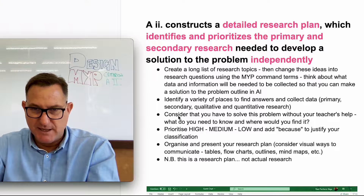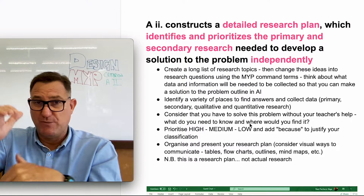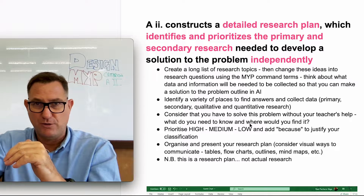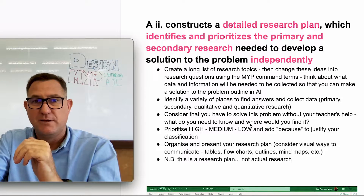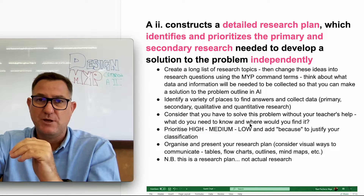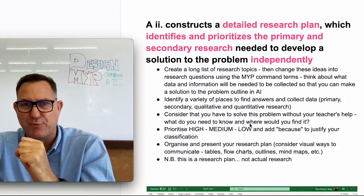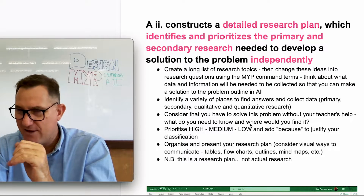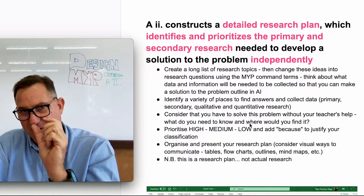The next step is prioritizing. Once you have your research topics and questions, go through them and label each one high, medium, or low priority. Then add a sentence explaining why. For example: 'This is a high priority because it is essential to me building my product,' or 'This is low priority because it doesn't really impact my solution.' Identify the priority level and explain why with the word 'because.'